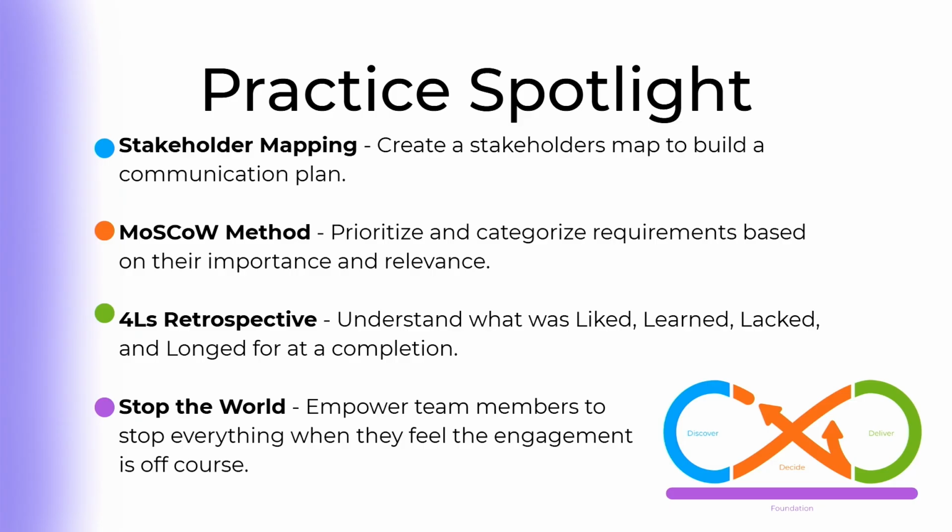So it actually stands for must have, should have, could have, and won't have. So based on that, what is an absolutely critical thing to do to get success in your project? That is a must have. A should have is like, yeah, not quite critical, but still really important. You really should do it to make your project successful. A could have falls into the nice to have category.